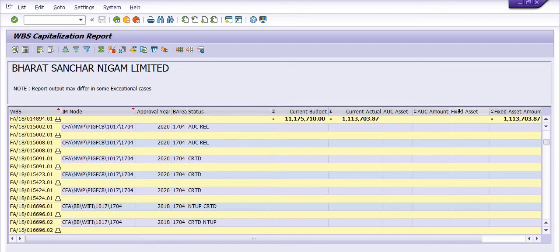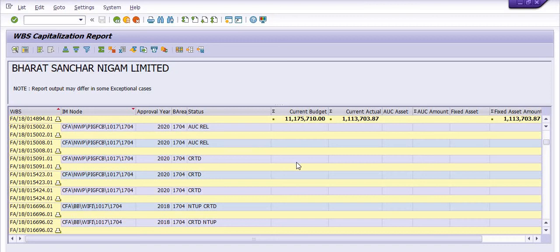After that, we have to submit the project completion certificate to the accounts and project manager team, and then we will take the permission and close the WBS. But if any single activity like posting of the borrowing cost, overhead cost, and any activities are pending, then please do not close the WBS.